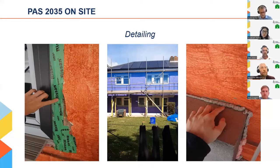If airtight tape is not applied correctly or is too heavily relied on, or if insulation boards are not fixed with the correct adhesive, jointing compound, and mechanical fixings, the risk of a performance gap, so often seen on past projects, becomes heightened. Scaffolding should be available to check critical junctions, and hold points established and followed from the outset to sign off key stages.